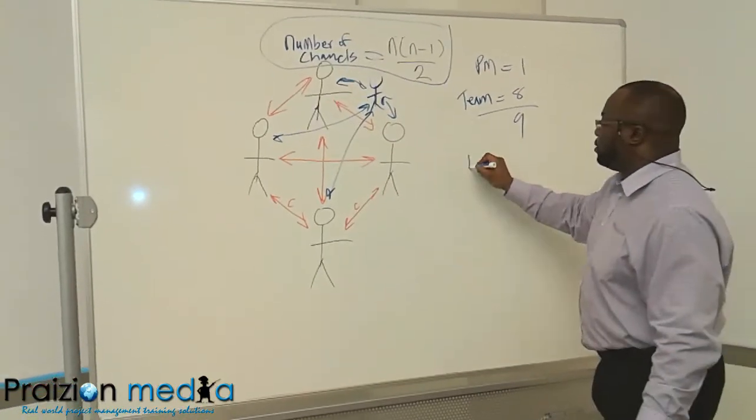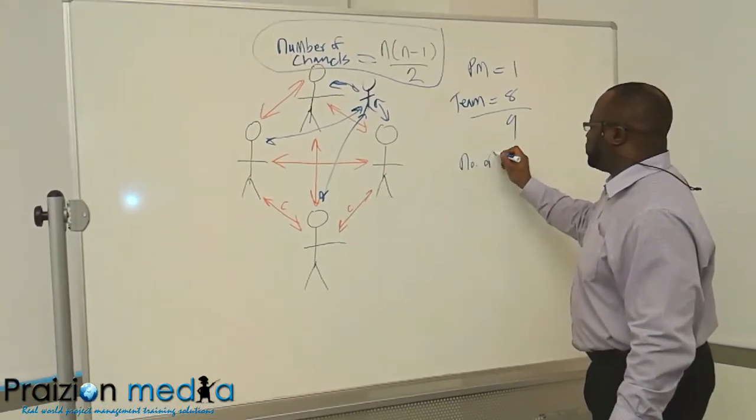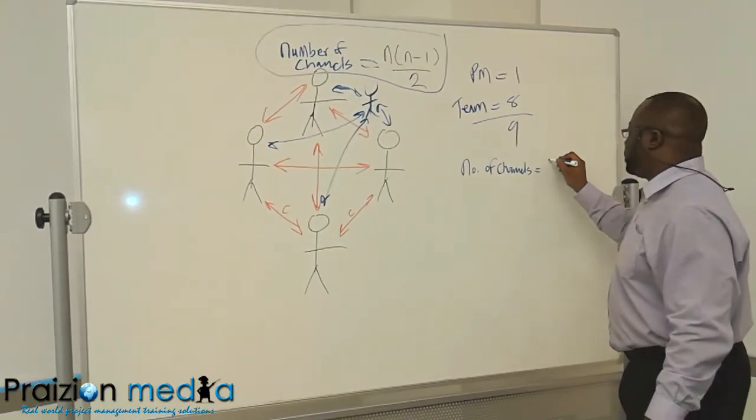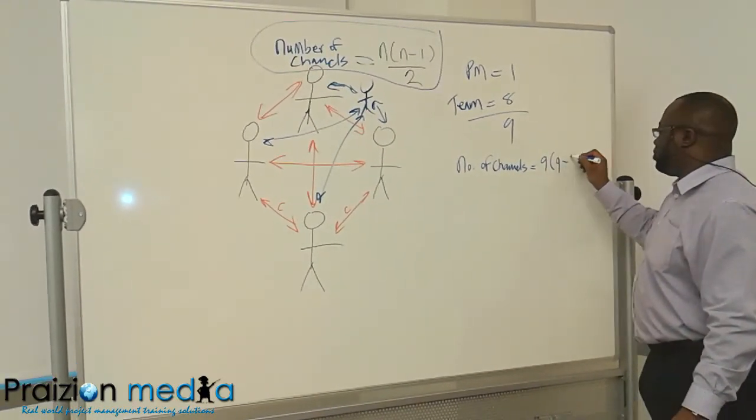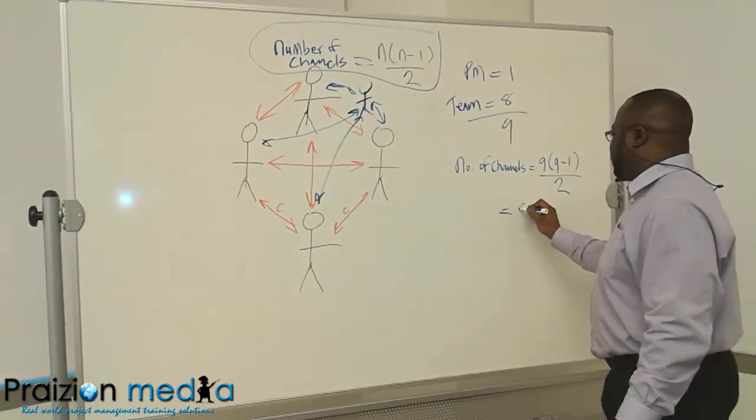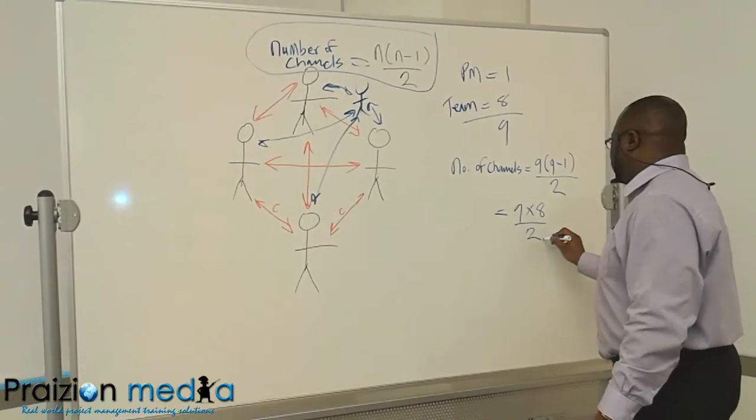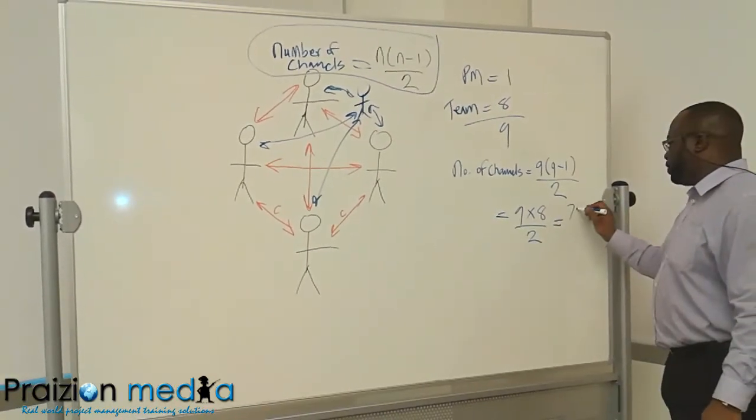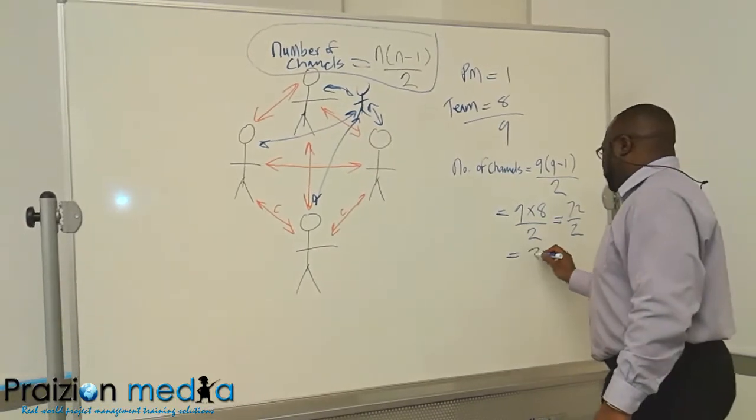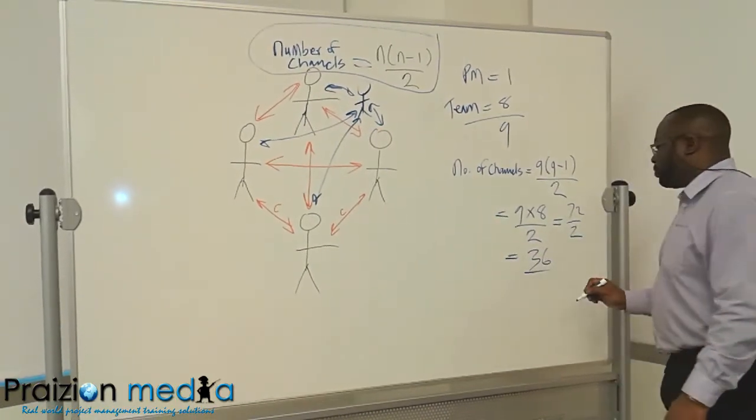So your number of channels formula is going to be equal to 9 times 9 minus 1 divided by 2, which is 9 times 8 divided by 2, which is 72 over 2, which is 36. 36 channels of communication.